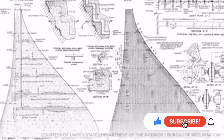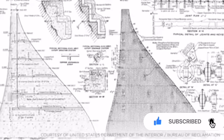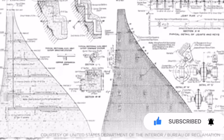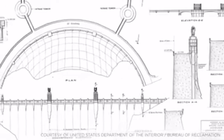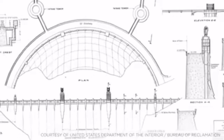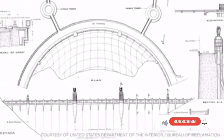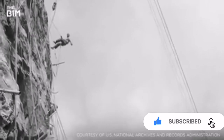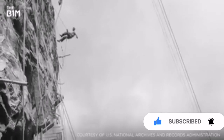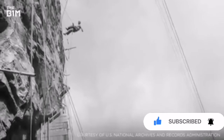The Hoover Dam employs a gravity arch design and is held in place by the weight of its concrete, together with the pressure of the water it holds, forcing it into the canyon floor and walls. Such a principle required the canyon surfaces to be smoothed as one of the first activities, to prevent leaks.